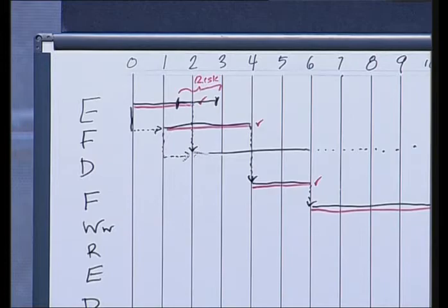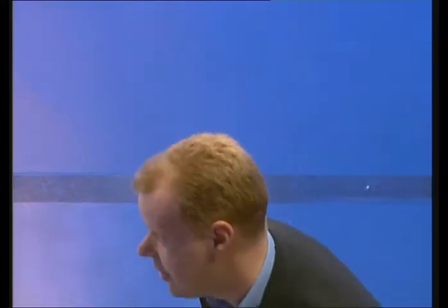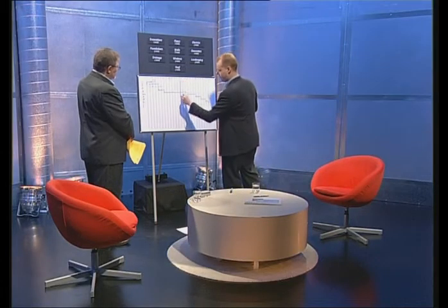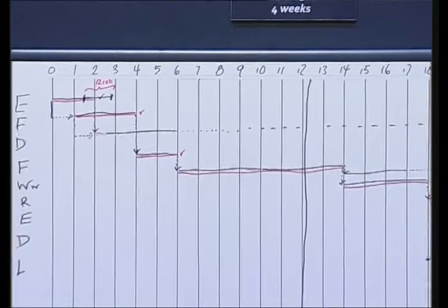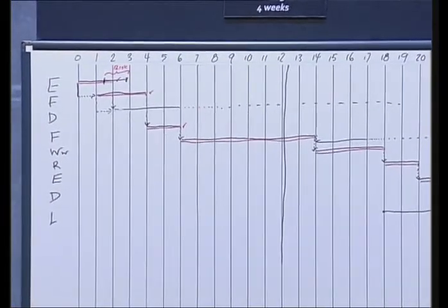through the project. Fundamentally, what a lot of projects tend to do is add a 10% contingency at the end. I'd be more inclined to add 11% to make it look like I actually thought about it. That's 10% on your 10%. 10% on your 10%. The best approach, obviously, is to put contingency on each of the activities. The reason for this is if you are a house builder building 1,000 houses and you're halfway through your projects or halfway through your year, you can actually then determine by activity how many of the activities were completed on time, and therefore you can see how much contingency you could release back into your business.